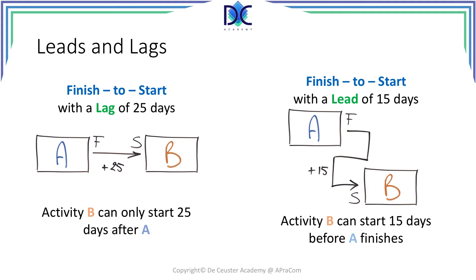An example is the curing of concrete. You typically have to wait 28 days before you can work on the newly poured concrete, so we add a lag of 28 days. Another example would be putting a primer on a wall and having to wait 24 or 48 hours to add the first paint layer.